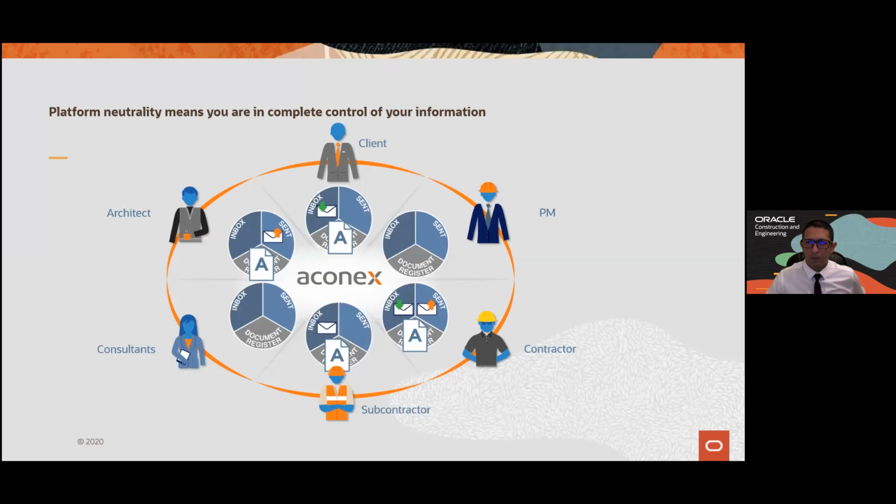So you'll find that what happens is a change will then be raised by the contractor saying, hey, we need to create extra, let's say the material that was in the specs is not available, or the extension has caused more steel work to be put in place. And so the architect will go and complete the design again in his favorite tool, whether it's Revit, and then share that document again as the revised document.